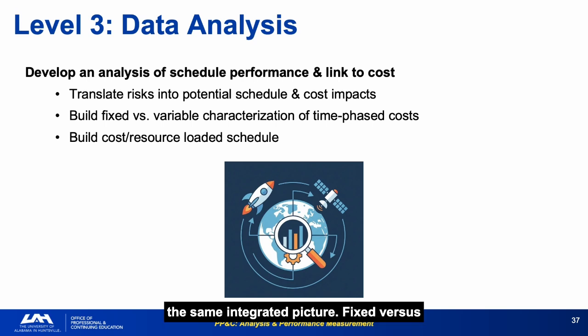Fixed versus variable cost characterization matters because schedule slips only drive cost growth into variable cost elements. Fixed costs are sunk regardless of timing. An analyst who can build an integrated cost and schedule characterization of a program has delivered something that no report generator can replicate.